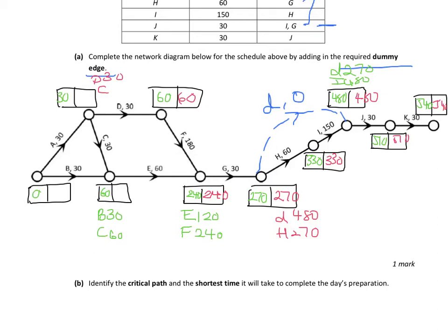So back down at the 240 minus 60 gives us 180. And back to the beginning, again, two paths, so A and B to consider. B would give us 150. And working from 180 minus 30 of C gives 150 again, smallest in the box, so 30 there, and 30 minus 30 A would give us 0.